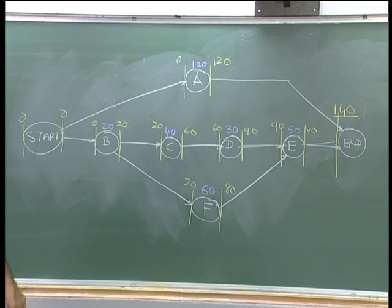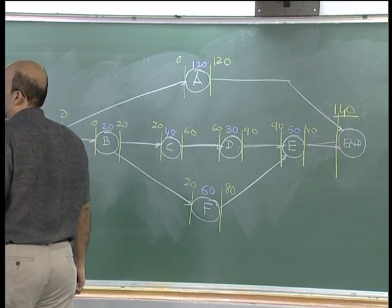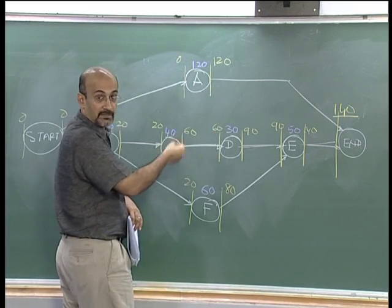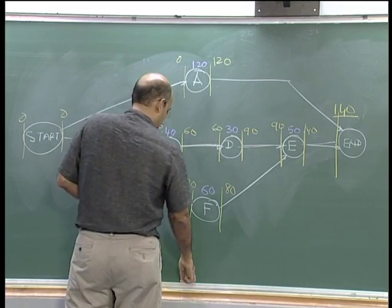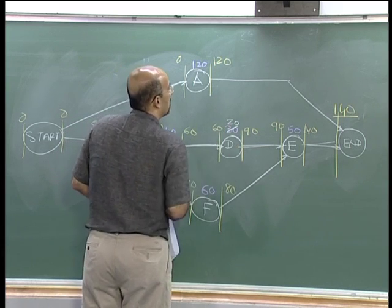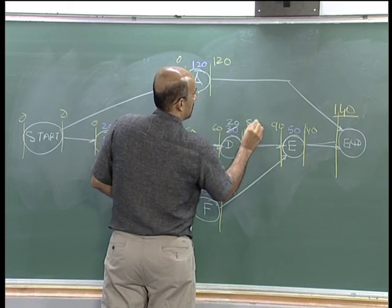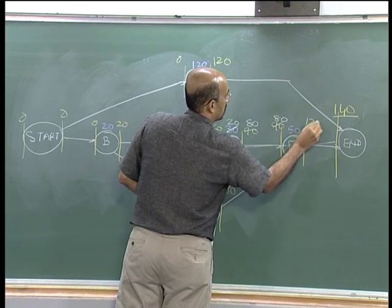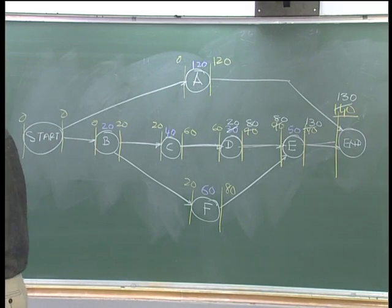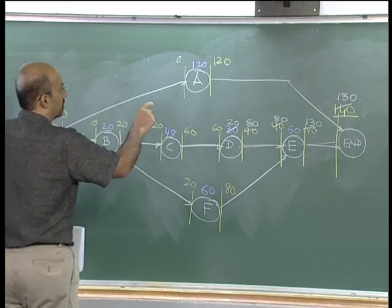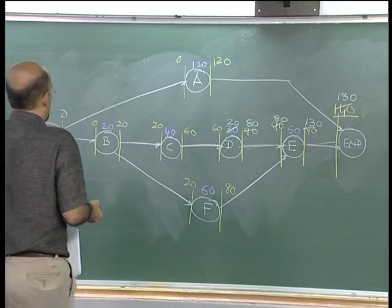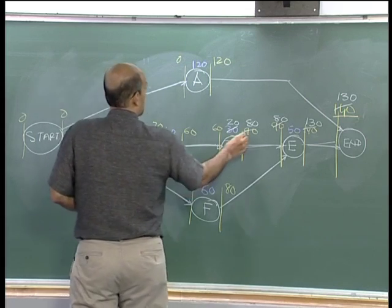So if I want to reduce duration, I have to crash one of these. My options are: D at 60 — it is so much less than the others — and by how much can I crash it? By 10 days. If I take it by 10 days, nothing else becomes critical meanwhile. So I take D and make it 20, and the project duration goes to 80. The crashing cost for D is 60 into 10 equals 600. D is now crashed out to the max, so I cannot take D anymore.